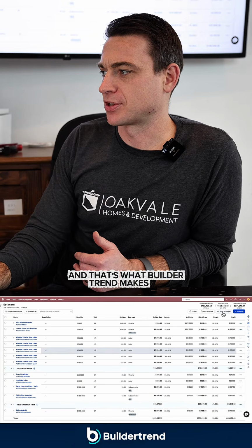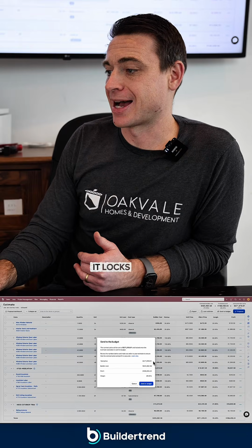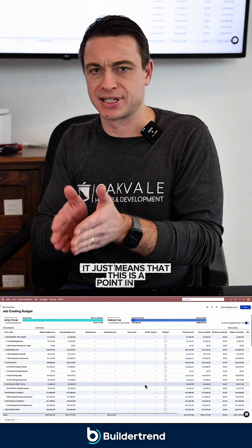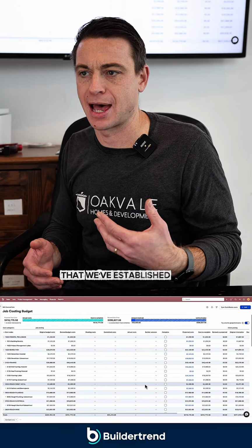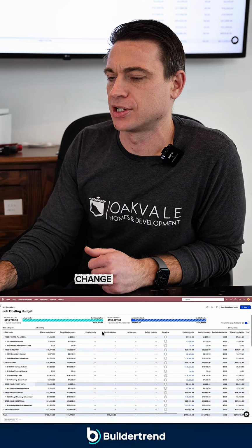And that's what Buildertrend makes so easy. I can work in my estimate, and then when I'm ready, I send it to budget. It locks in the price, and now I can continue working on it. Does that mean the price can't change? Absolutely not. It just means that this is a point in time, a line in the sand that we've established as our original price, and then we use change orders and selections, and we can of course change it from there.